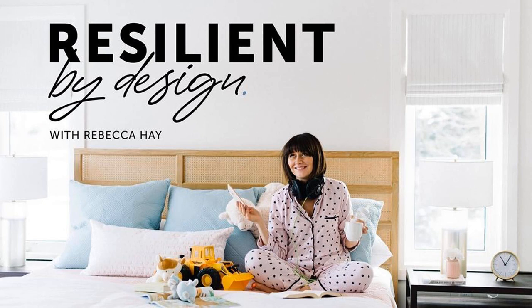So you can also, and this improves your service level, because you can get multiple construction quotes if you want, right? Because you have a full drawing package or a full decor package. You can get different drapery installers to quote. You can get every person to come in and give you their 2 cents, and they can't say, well, it depends on the design. Has that ever happened to you? And then you're like, well, it's going to be like this. What do you think?